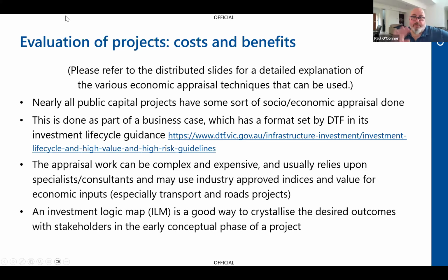But putting aside that, which is important to do, an investment logic map, which I think is the exercise you're going to do after this, that's why I thought I'd bring it up, because it is a really useful tool. It's a really good way to crystallize, with stakeholders, what you're trying to get out of this project, particularly in the early concept phases when you're designing or envisioning that particular project. And here's one I prepared earlier.